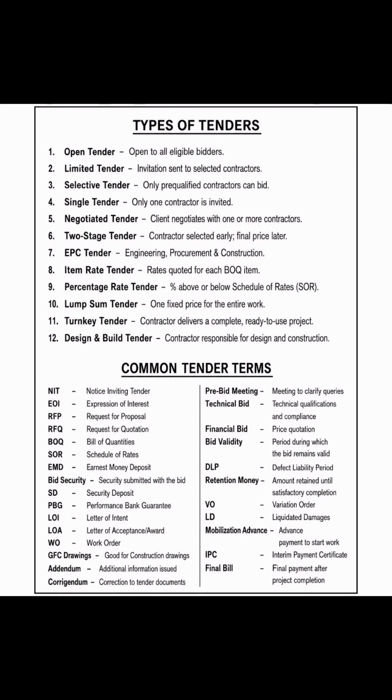So limited tender is an invitation sent to selected contractors. It is an invitation, but it's usually sent to specific contractors. So maybe if the bid is about electricity, like solar street lightings, it's going to be sent to just those contractors in that sector, in installation of street lights, right?